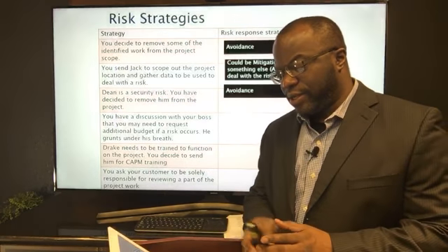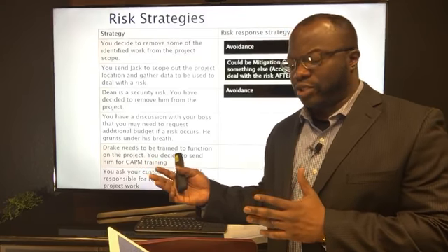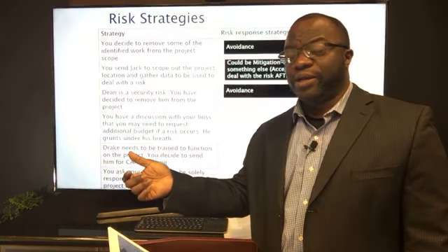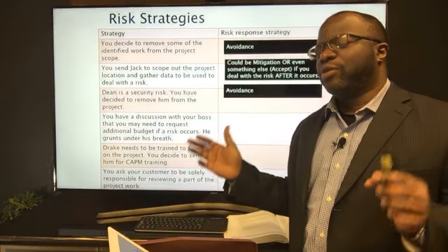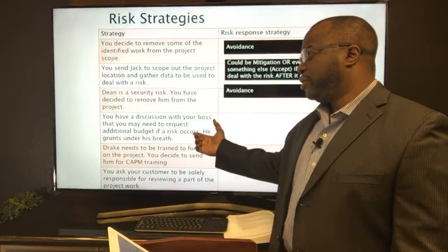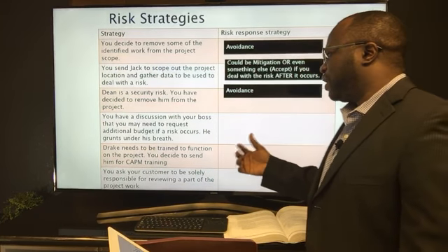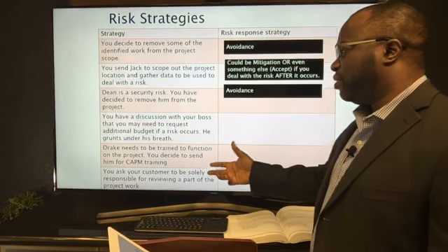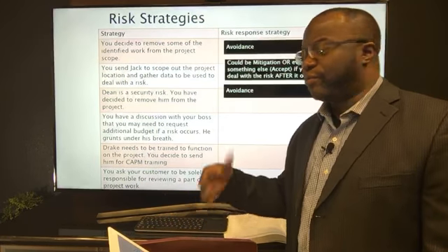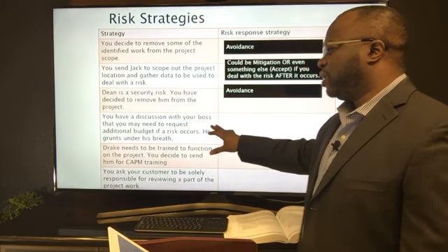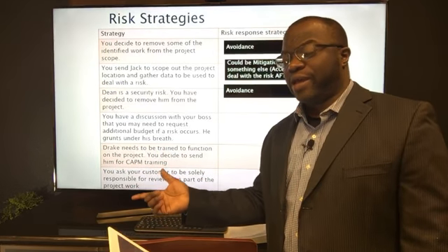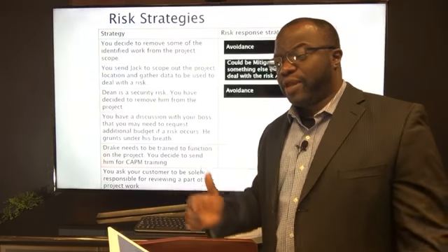You have to watch the subtleties. So I've found this is an area where we have a lot of improvement options, okay? So if you're having a discussion with someone and saying, well, if this happens, I'm going to need some money, you're saying, I'm not going to do anything about it. If it happens, then I'm going to need some money. That's the conclusion you draw. But if you have a discussion that you need additional budget to deal with a risk or to deal with the probability or impact of a risk, that is mitigate. Right now, this is not mitigate, because you're not even saying I will need, you're saying, I may need some money if that thing happens. You've accepted it. You're saying, if it happens, then I'll deal with it.